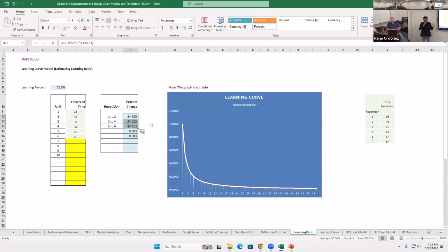Right? So think about the consequences of not applying the learning curve appropriately and accurately. Talked about those 2. Overpricing, underpricing. Well, it seems the steps would be to find an example of data to locate a good learning curve and then use that learning curve to estimate, forecast a certain projection. So in a real life scenario, you've developed your learning curve based on a current crew, right? And then what happens if you replace part of the crew or the whole crew? You need to redetermine your learning curve based on their training, right?